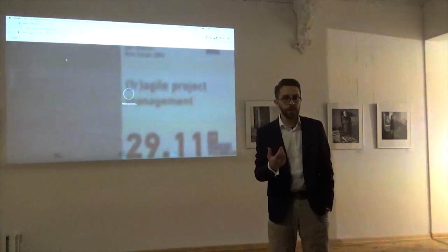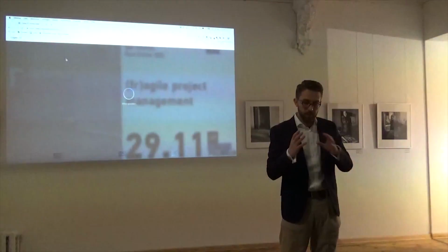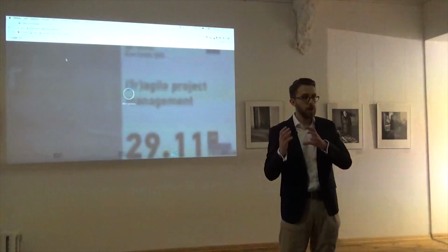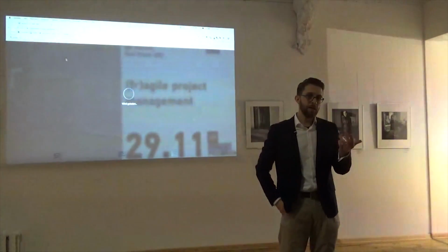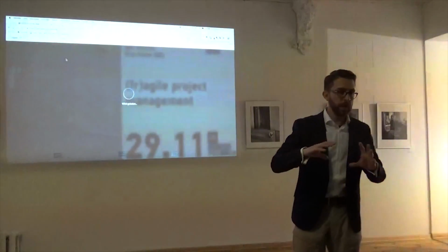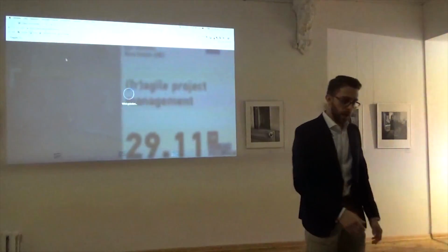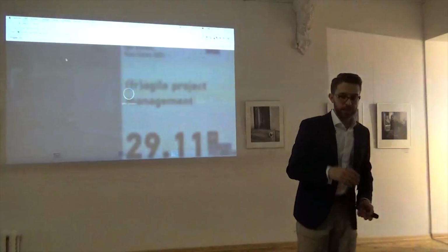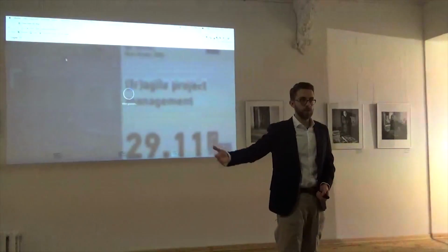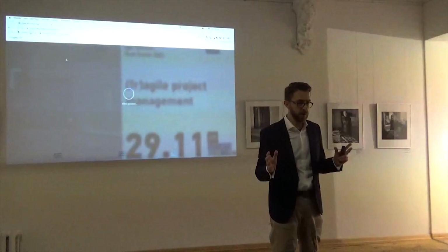And there we try to have a culture of collecting these tasks. We do, not on a daily basis, that's a lie, but once a week, we make photographs of this board for documentation purposes, right? We document, so we can always say when which milestone was achieved.